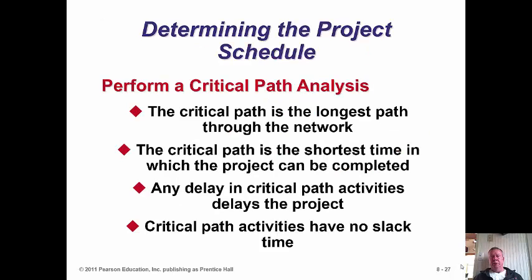The critical path is the longest path. The critical path is also the shortest time. So keep that straight. Any delay in the critical path affects the project. And critical path activities, by definition, have no slack time.